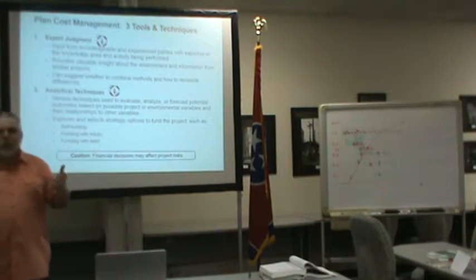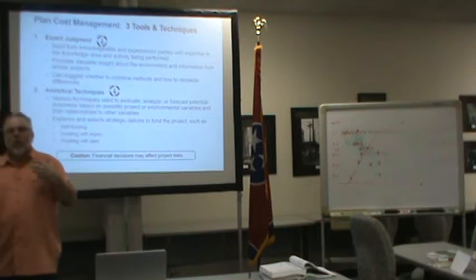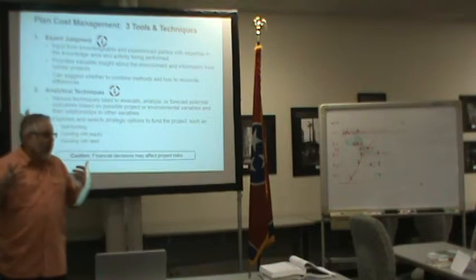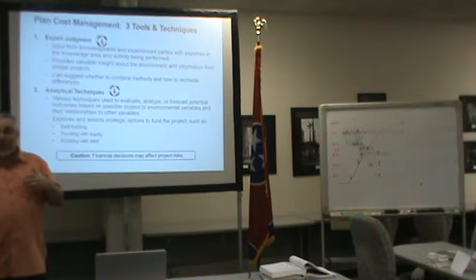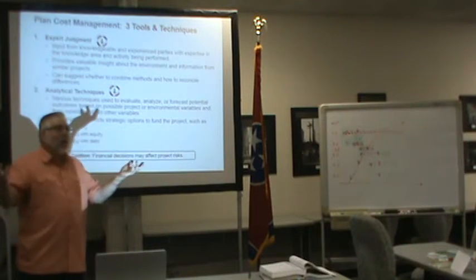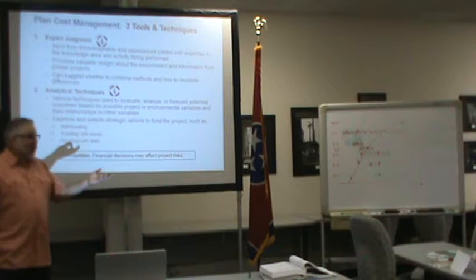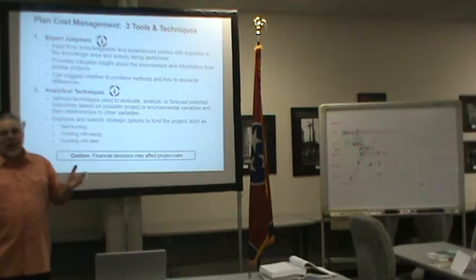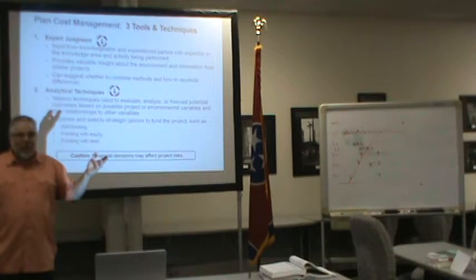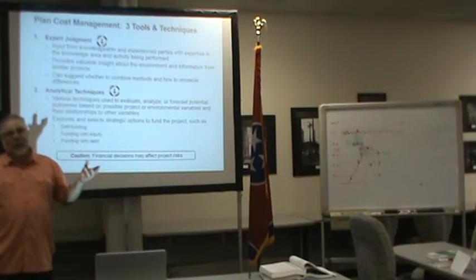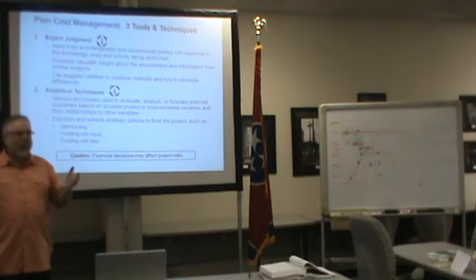But being able to do things with time value of money matters if projects are long enough, or you're having to fund phases of projects. Then it would make sense that you would want to understand something about time value of money. Now, in the world that we've lived in for the past few years, where inflation is less than 1% or less than 2%, does it really make a big difference on a 1 or 2 year project? Not at all. On a 10-year project, yeah, I want to be concerned about it.